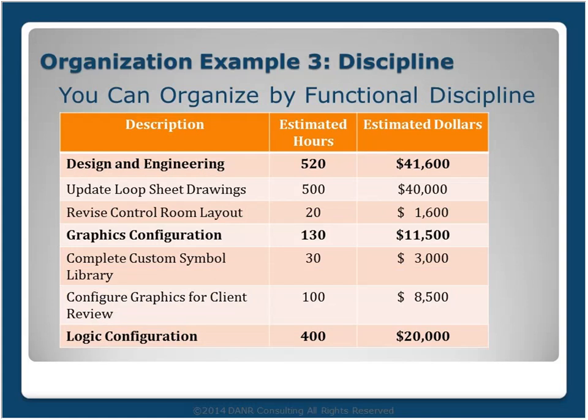So this is a common way for many integrators to handle budgets within their financial systems. So it tends to be a pretty popular approach to how you set up your scope, your schedule, and your budget in the FEL phase. The downside is that if you have multiple organizations involved, for example, you've got an end user that's doing pieces of the work and a control system vendor doing other pieces, it can sometimes be difficult to extract their individual components of work activities out.